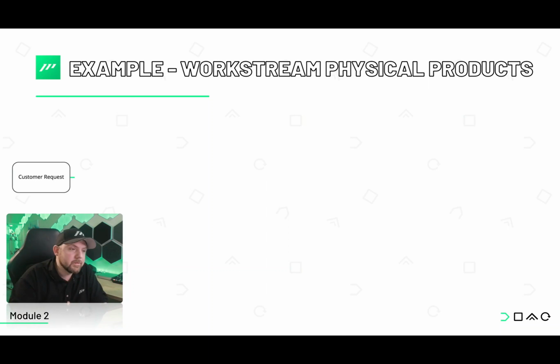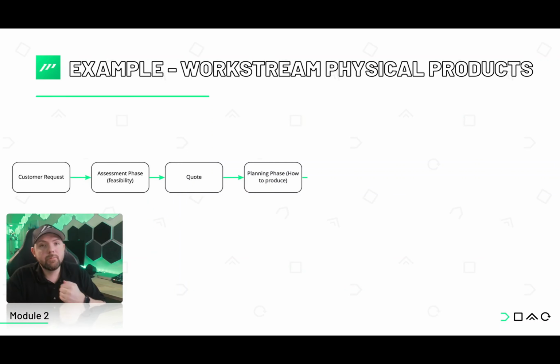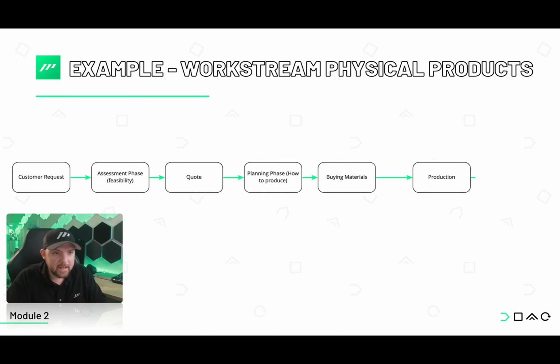So I asked this person, tell me, what is the typical work stream in your company that brings money to the table? Okay, so explain to me. And he says they get a customer request and then they have an assessment phase, a feasibility phase, where they say, okay, is this something that we can actually build in our company? Can we create this? Once they have this, then they create a quote and send it out to the customer. Once this quote is accepted, they go into the planning phase, how to produce it, and they go more detailed. They invest the time then. And then they buy the materials needed for the production and produce the products and then they ship it.